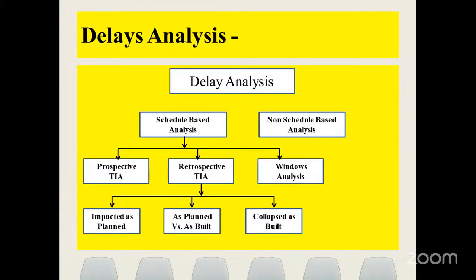Then delay analysis. There are two types mainly, schedule-based analysis and non-schedule-based analysis. In the construction industry, we use schedule-based analysis; nobody follows non-schedule-based analysis. So prospective, retrospective, and windows analysis. They are time impact analysis.